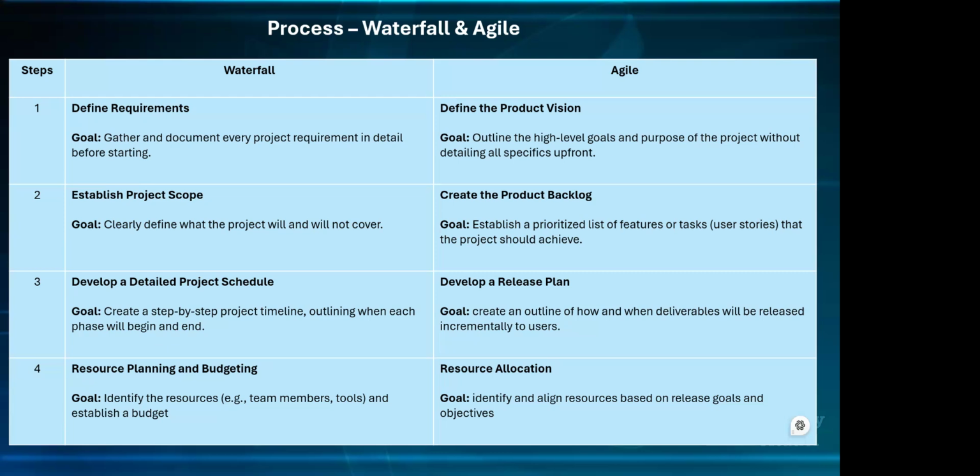Because of their own technical knowledge, even though you've scheduled 6 weeks for it, they're able to tell you that what you're looking at is not going to take 6 weeks, and they'll give you a breakdown of why. So they're not just going to say, oh, it's going to take me 8 weeks to do it. You understand? You're saying, within 6 weeks we want to do this thing. Is it achievable? Is it realistic? If it's something complex and it's going to take more than that, definitely they will let you know. You bargain with them: I know you're saying 8 weeks, but really it's tight for us, money wise and everything. We can do maybe 7 weeks, but not 8 weeks, and all those agreements are put in place.